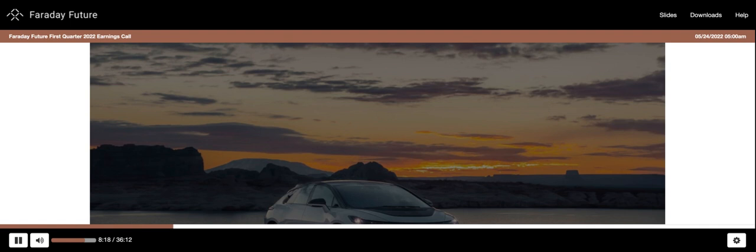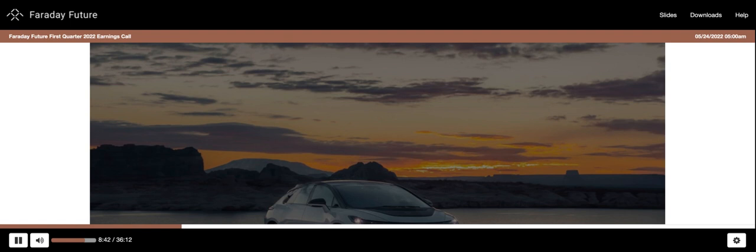About 80% of the equipment we need at Hanford is already on site, and the rest is on schedule to be delivered. Previously delivered equipment is being readied for installation. As a reminder, completion of equipment installation is the sixth and final milestone before we start our production. I want to thank our vendors, our contractors, our employees, and everyone else who has helped keep us on schedule during this very challenging period for the economy and for our team. The FF91 program is on track and proceeding well, and we are also making important progress on our long-term business plan. This includes the development of the FF81 program.